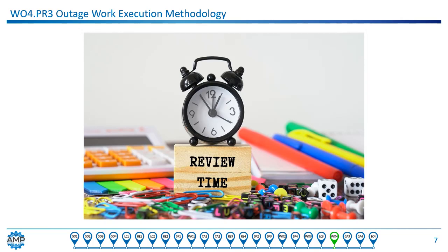Outages aren't over until they've been reviewed for lessons learned. When working on this function, consideration must be given to the idea of what to do when the outage is over. If the organization is new to outage management, it's a good practice to develop a formal outage closeout checklist to ensure all necessary data is collected.